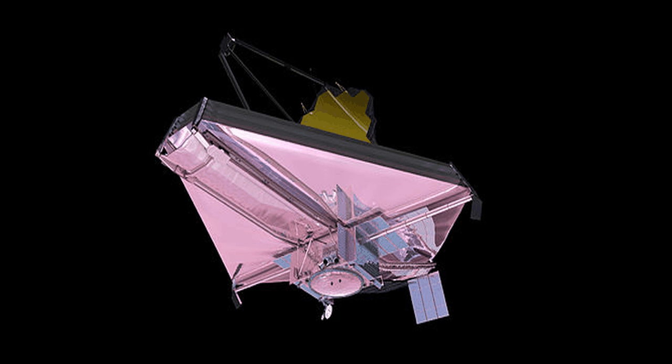Detailed design and construction. In January 2007, 9 of the 10 technology development items in the project successfully passed a non-advocate review. These technologies were deemed sufficiently mature to retire significant risks in the project. The remaining technology development item completed its technology maturation milestone in April 2007. This technology review represented the beginning step in the process that ultimately moved the project into its detailed design phase. By May 2007, costs were still on target.